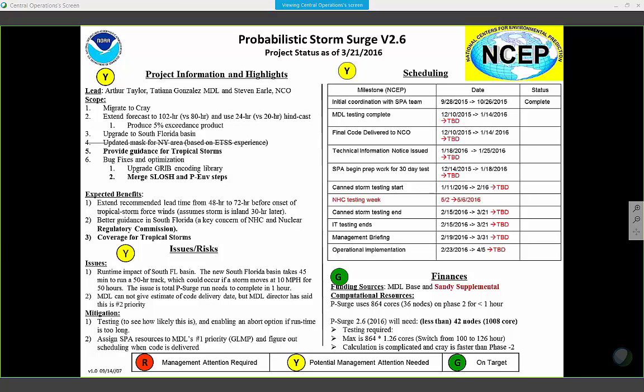No, we haven't done it. Okay. I think it's in the next one, isn't it? No, no, item one, consensus topology and land-sea map. We do so many of these each year. So when we put in the blend in January, the original goal had been to have the same terrain used across all the inputs to the blend, but we couldn't do that and get the blend in on time. So here's the RTMA doing it.